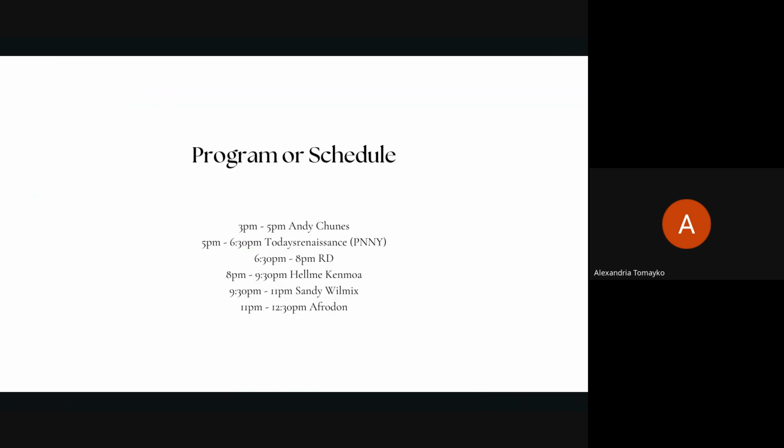Okay. So let's not get overwhelmed yet. Let's just take a breath. Everything's going to be okay. Right. So you see that this person started at 3 p.m., but things need to happen before. The bar needs to be stocked. The gates need to be open. The place needs to be checked. The registration needs to be set up. People need to register. The tables, everything needs to happen before, right?